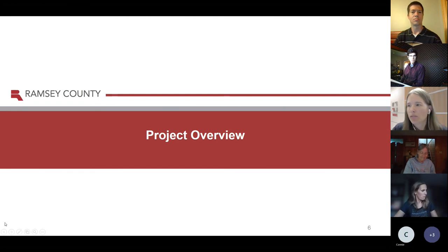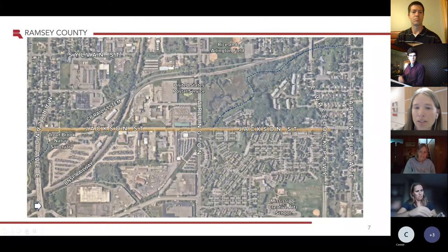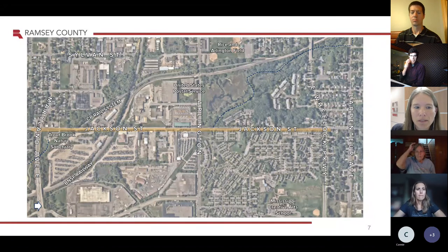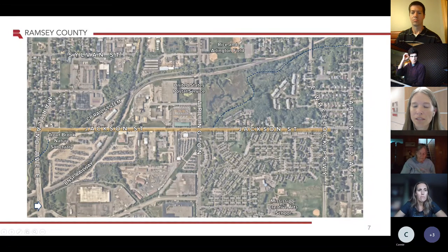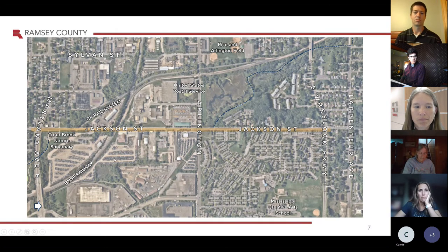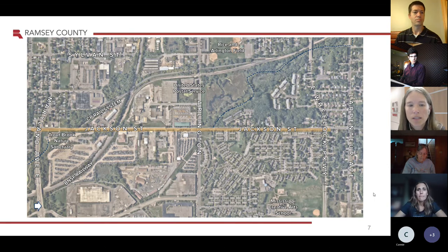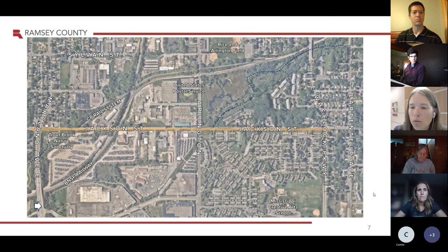For the project overview, you can see a map on your screen right now showing the project limits. On the far left is Maryland, and north is to your right. So Maryland's on your left, Arlington's in the middle, and Wheelock's on the far right. From Maryland to Arlington, the plan is to fully reconstruct Jackson Street. And then from Arlington to Wheelock, we will be incorporating some new pedestrian amenities.